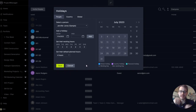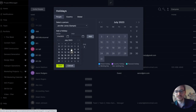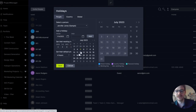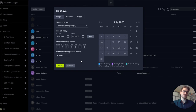You can also set holidays by user. Maybe Jennifer Jones has maternity leave coming up — use the calendar to define when she's going to be away from the office, and now I know exactly when Jennifer Jones is available for me to schedule work.